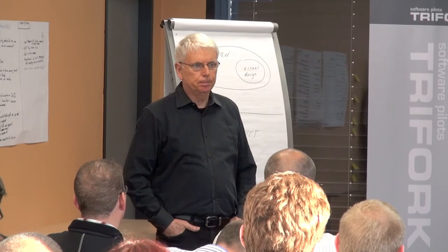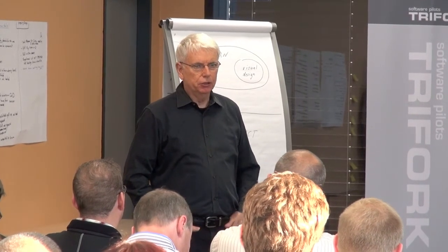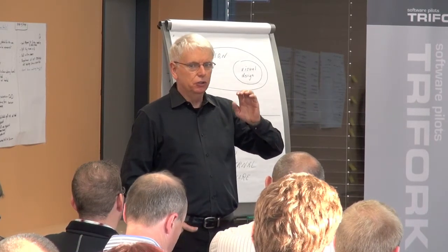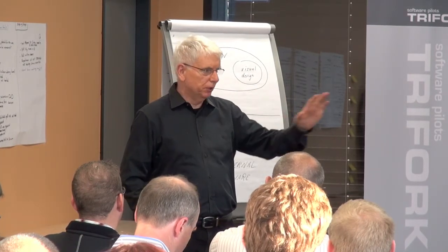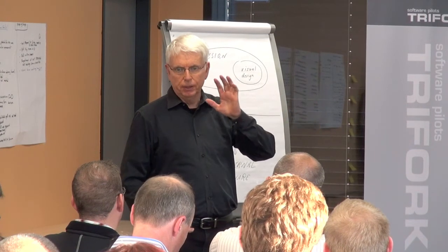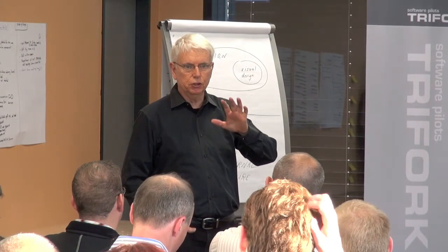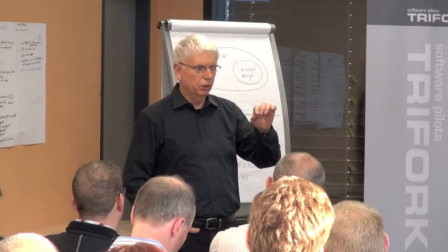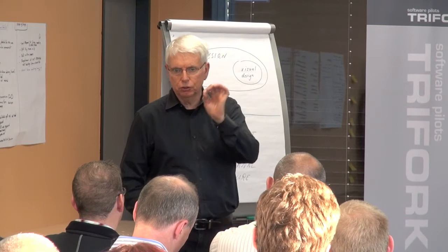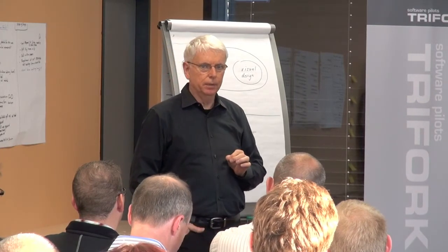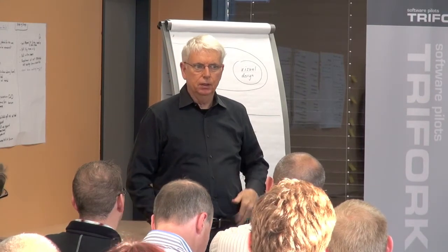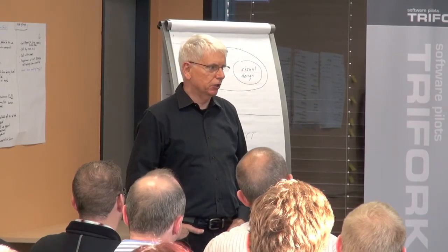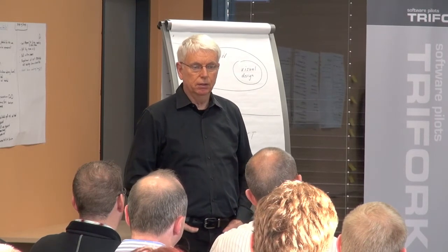So it became clear to even all the developers that you could not assume anything about any application going into production unless that application had a fully functional prototype tested against a reference physician group who would approve its workflow, its look and feel, and its value. And so the development team literally started demanding of product owners. They would not write a line of code until the product owner had done that.